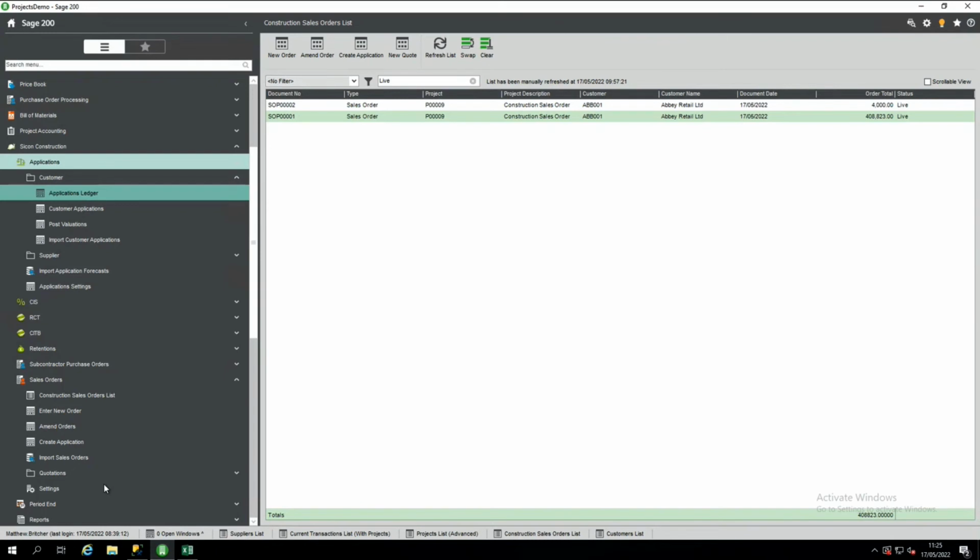If someone sends in an invoice, let's just say you're laying 50 meters of road, and actually there's been a change, and now it's 75 meters of road. So you're just getting an invoice for 75 meters of tarmac being laid, and then someone in finance has got to try and work out how to split that from a cost side, particularly. Then that can start to get quite complicated.